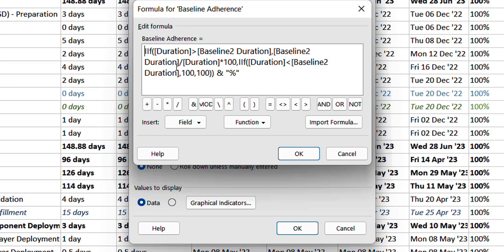So it will divide the baseline duration - assuming the current duration is greater - it will divide the baseline two duration by the actual duration and multiply by 100 to come up with a percentage.